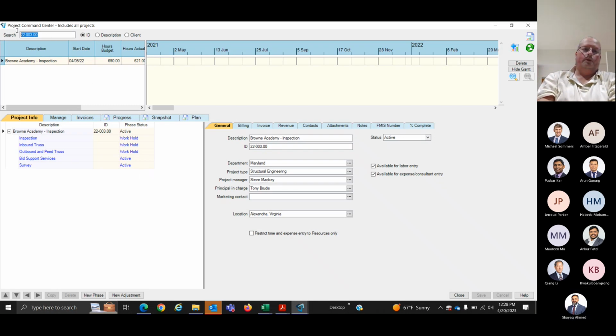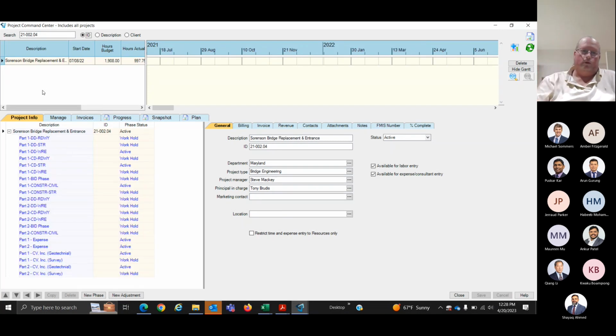So let me do it. You're jumping a little ahead of me, Shaq, but that's fine. We can go straight to that. Let's go back to the same project where we're in Sorensen. This is an example of one in which we have done that. If you look through here, most of the tasks are actually on work hold, because we've done DD, with the exception of water resource, which still has some permitting stuff. So DD is now closed for both roadway and structures.